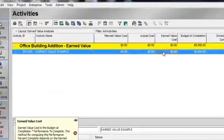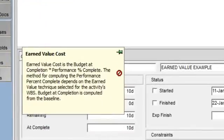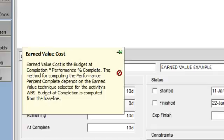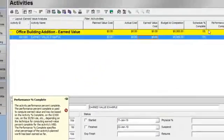Let's get a definition now for earned value cost. Earned value cost is the value of the work performed as of the data date. Earned value is calculated as budget at completion times performance percent complete. Performance percent complete specifies what percentage of the activity's planned value has been earned so far.